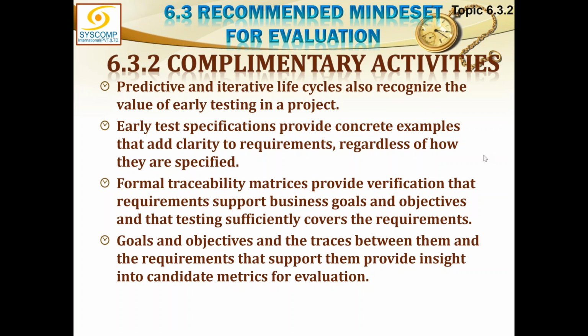Predictive and iterative life cycles also recognize the value of early testing in a project. Early test specifications provide concrete examples that add clarity to requirements regardless of how they are specified. Formal traceability matrices provide verification that requirements support business goals and objectives and that testing sufficiently covers the requirement. So that's what we have already done.